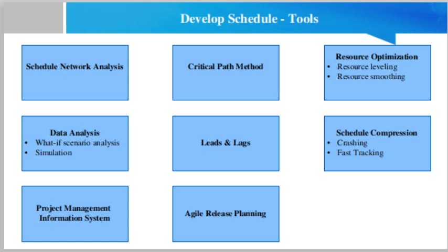Leads and lags. Leads and lags are refinements applied during network analysis to develop a viable schedule by adjusting the start time of the successor activities. Leads are used in limited circumstances to advance a successor activity with respect to the predecessor activity, and lags are used in limited circumstances where processes require a set period of time to elapse between the predecessor and successor without work or resource impact.